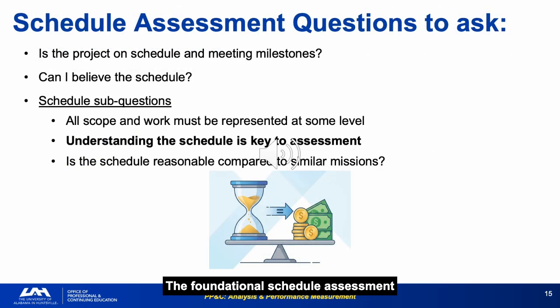The foundational schedule assessment questions are: is the project on schedule? Can I believe the schedule? Is it reasonable compared to similar missions? And is all scope represented? The question, can I believe the schedule, is separate from, is the project on schedule?